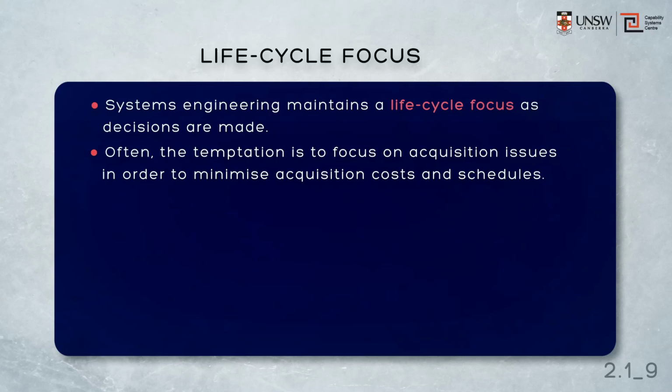It's proper for project managers and their teams to focus on acquisition, that is their role, and we want to make sure that we meet the stakeholder requirements, minimising cost and schedule. But a lack of consideration of whole-of-life issues can often lead to larger than expected costs during utilisation that are met from budgets that are generally inappropriate and insufficient to keep the system in service.